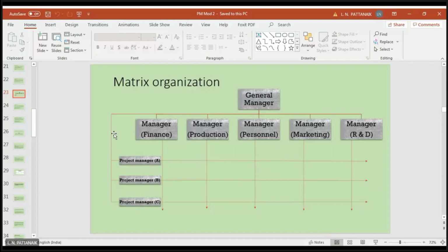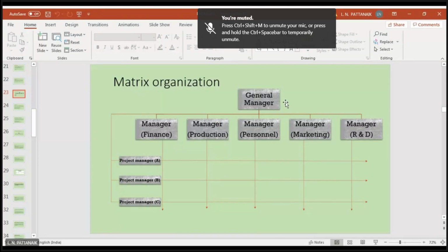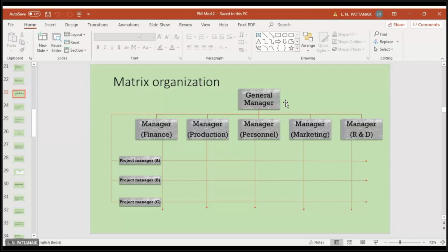They will report to their head. So he is the head for the project. And if it is based on some kind of product division or area wise division, then also there will be some intermediate person between the chief and the managers, so that he can lessen the burden of decision making for the general manager. So the more persons report to a person, the more it increases his burden, in the sense that he will have higher risk of taking decisions, and decision making always creates the burden.